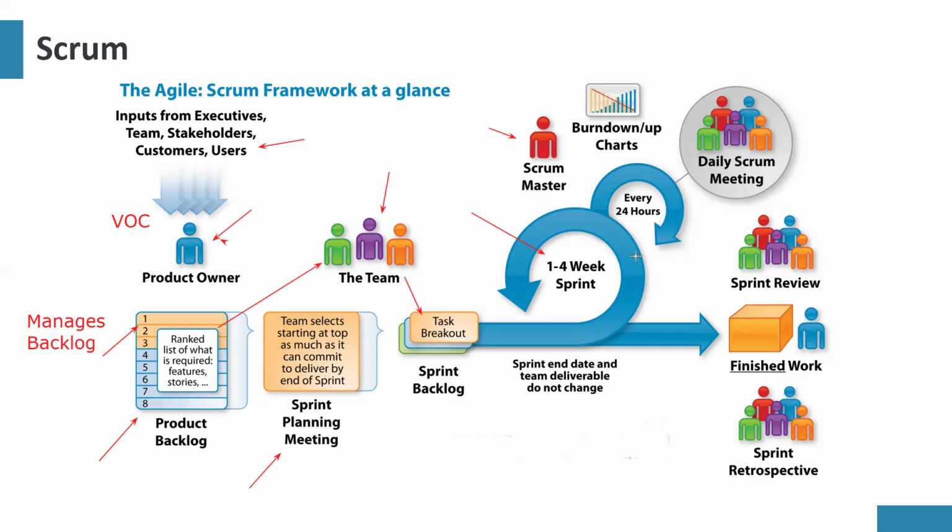So within the time of your sprint, what you're trying to do is create all the features you put in the sprint backlog. And there's another thing that happens every day during the sprint. There's what we call the daily scrum meeting. Daily scrum meeting is a 15-minute meeting where team members catch up on what is going on, what they've done so far, what they want to do on that day, and the challenges they are facing.